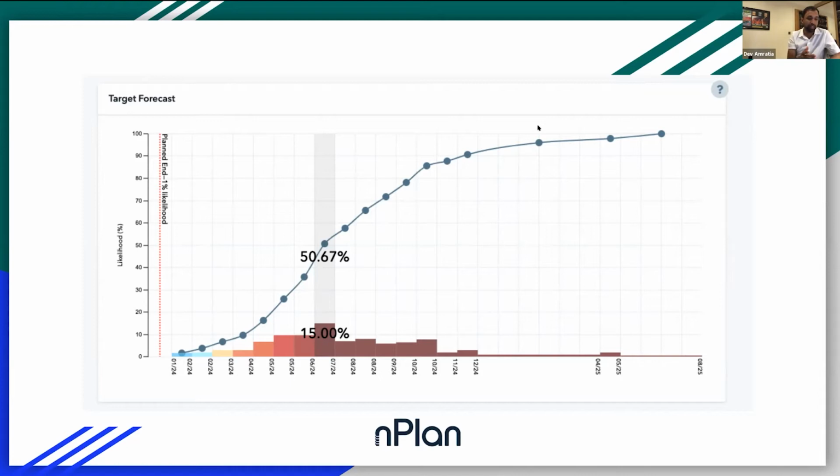One, you have to try and work with the contractor to say, we understand what risks exist on the project. What is a fair distribution of these risks? Some of them are owned by the client, rightfully so, and some of them are owned rightfully by the contractor. Apportion them. So you start with saying, look, liquidated damages should not be incurred until percentile point X, right? And you could pick X as P50, P70, whatever risk threshold you want to set. It is later than you were hoping the project would finish at, but it is real. And then agree which risks should move to which organization.